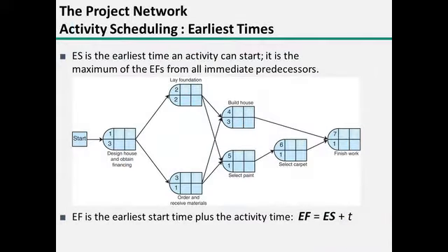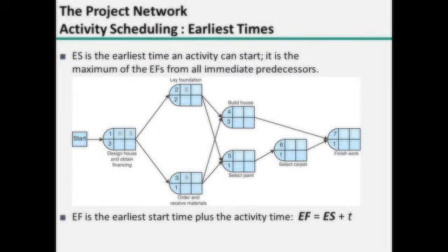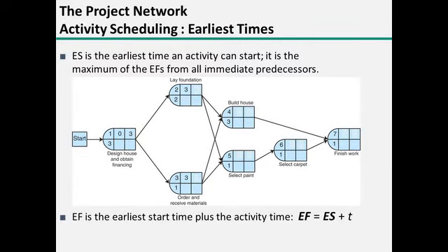So here's our house, and we have the activities labeled with numbers and the duration times. The earliest start time for that first one, the earliest time it can start, is month 0. And then that one's going to take 3 months. So those next activities, 2 and 3, can't possibly begin until the 3rd month. If I fill in these times, it looks like this, and you'll see for activities 2 and 3, we could start in month 3 because by then the design has been finished.